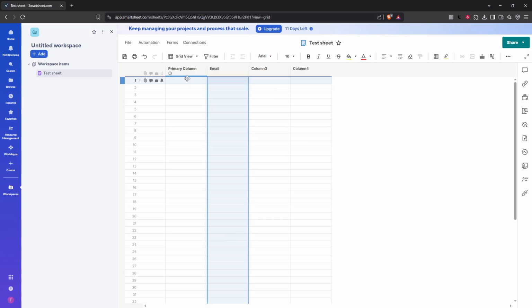You might also want to create a hierarchy within your tasks for better organization. If so, right-click and choose Indent Row to establish parent/child relationships between tasks. This indentation can significantly enhance clarity, especially in more complex projects.